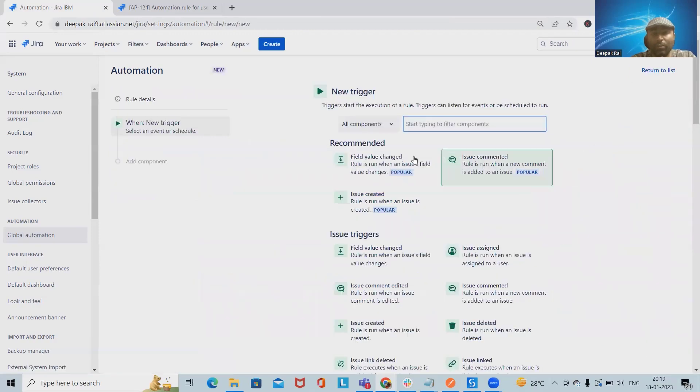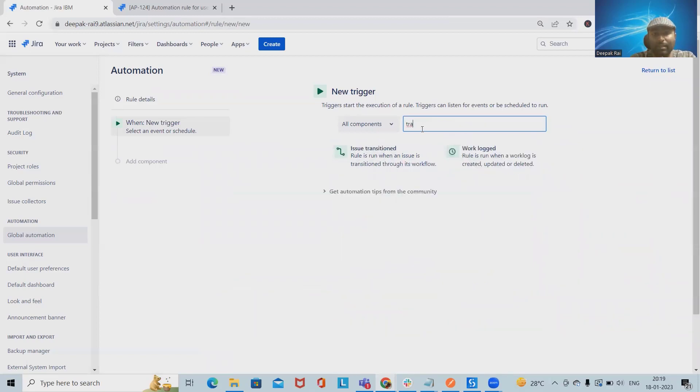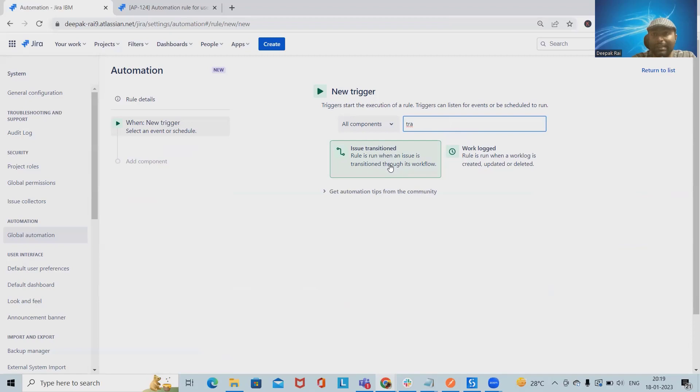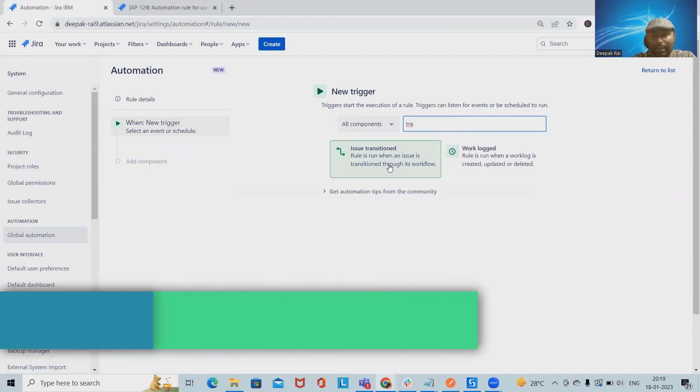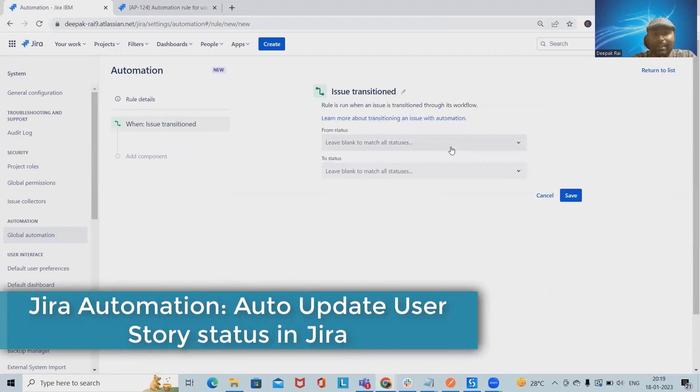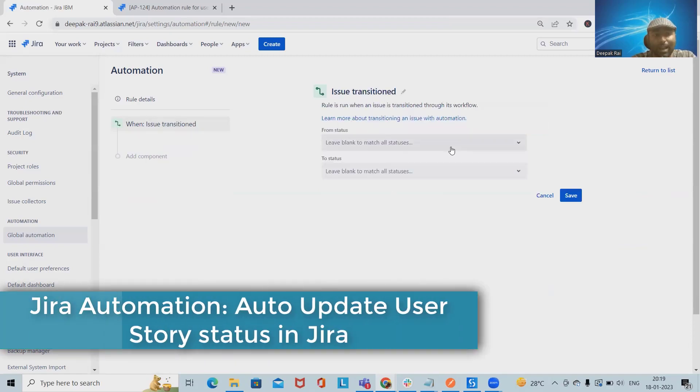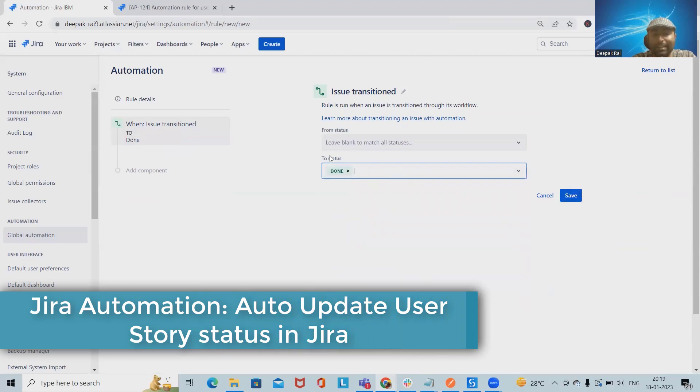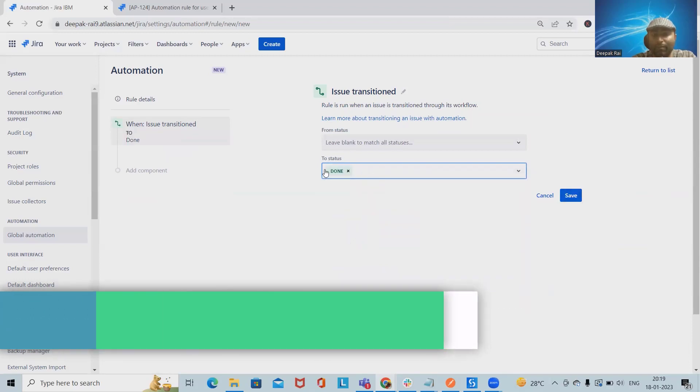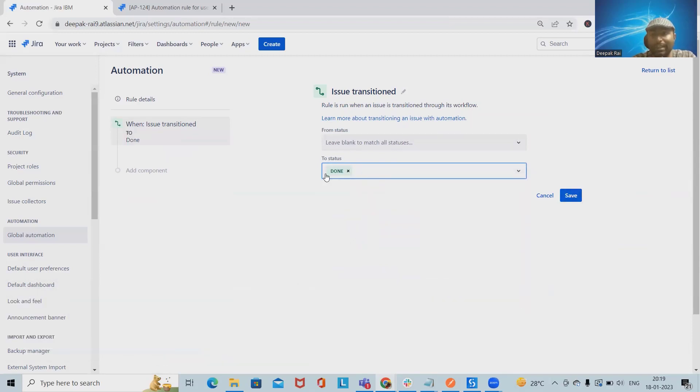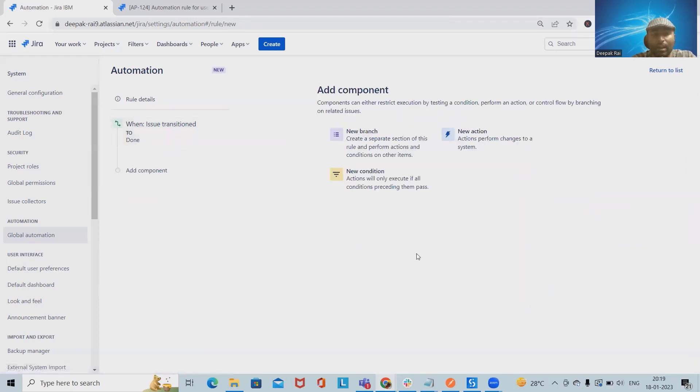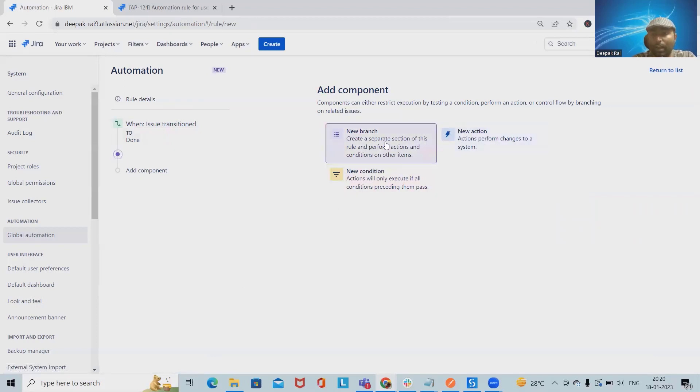We have to click on create rule, and from here we are typing transition, that is issue transitions. Issue transitions means moving from one step or status to another status. We'll select here as done. Whenever the issue status is done, it will go to the further step. After that, we have branching options, creating separate sections for this rule.